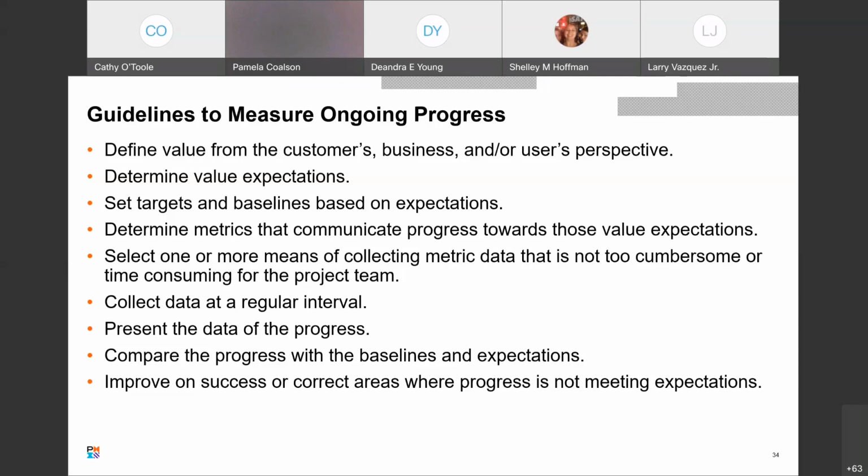So this is very basic stuff that we do as a project manager, and you can set metrics. A lot of the standard metrics for software development is either you're on target, you're ahead of schedule, or you're behind schedule. And then there are some other ones with red, yellow, and green. Green meaning you're on target, red meaning you're behind schedule, and the yellow means that you're working on it to get it back on track. So different ways of monitoring that.